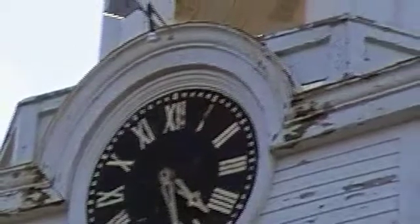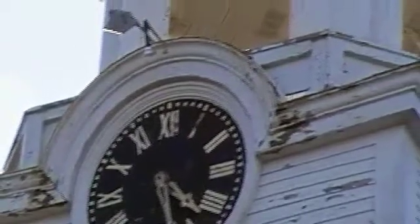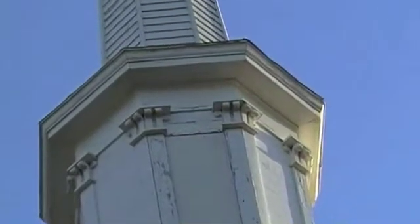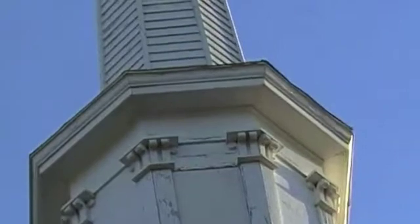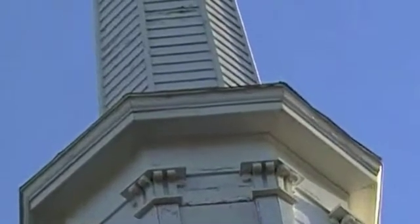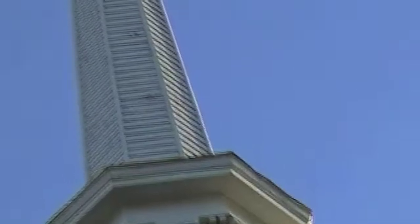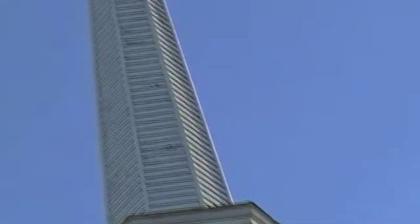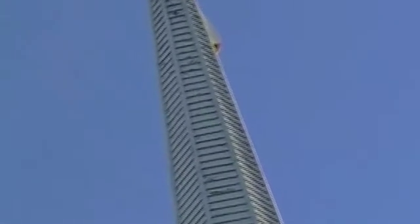We've estimated around $15,000 to secure the roof and the parapet, and also the wood molding around the clock face and the actual face itself, repairing the dials, which will be done by manually taking them off and regilding them. Just to be clear on the cost between the town and First Parish throughout the estimate, the town is going to be responsible for the actual maintenance of the clock mechanism itself, and I got a bid from the town manager in the amount of $7,500.